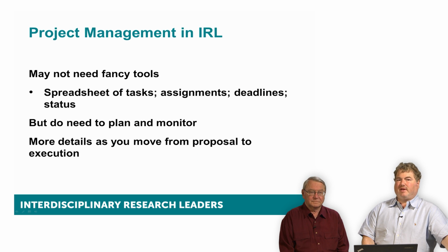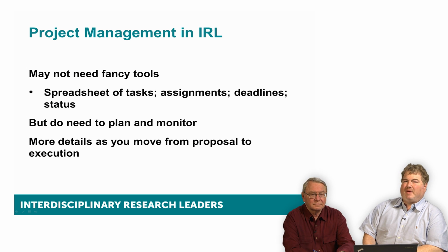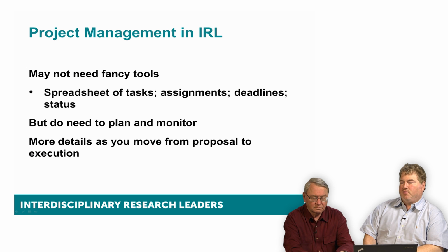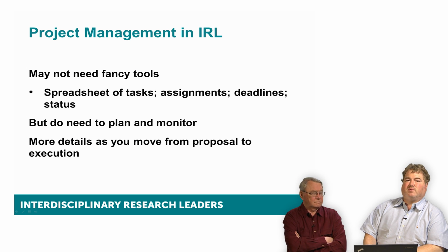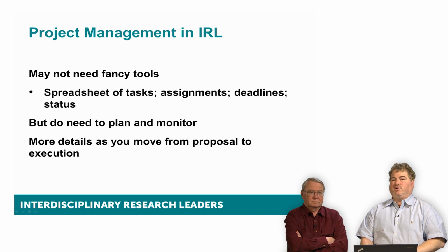So as we think about this in IRL, project management may not need particularly fancy tools. Obviously, if you have project management experience and you want to use project management tools, that's great. But we're giving you access to Google Sheets, which is a shared spreadsheet system, and you can put together a spreadsheet of tasks, who they're assigned to, the deadlines, the status.